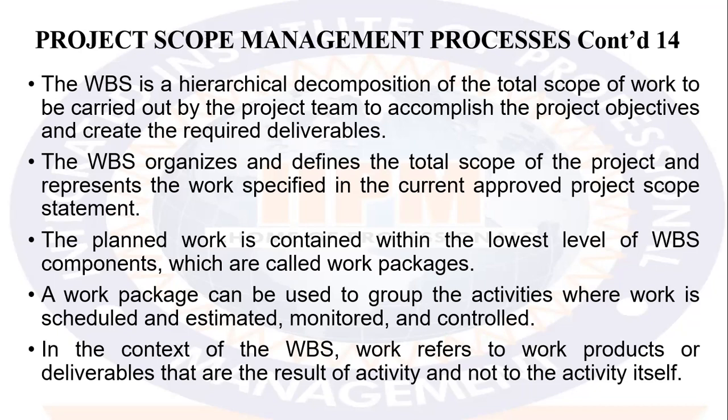In the context of WBS, when we say work, we are looking at the expected deliverable, not the work as activity. But when we say work package, the work package is the activity that is being done to deliver the work. Take, for instance, using a WBS as a case study, the work to be done is the foundation. When we say work, to us, work is foundation. The foundation is a deliverable in the context of WBS. But when we say work packages, we talk about the activities involved in giving the foundation.